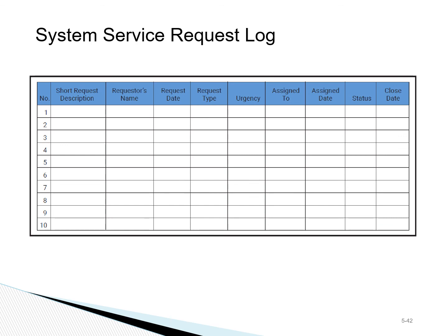And if the change is approved, then of course we need to update our baseline cost and schedule to reflect that change. This essentially is the tool we use to control the scope in the scope management process.